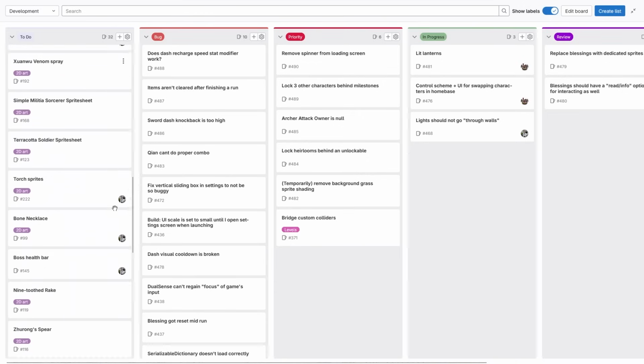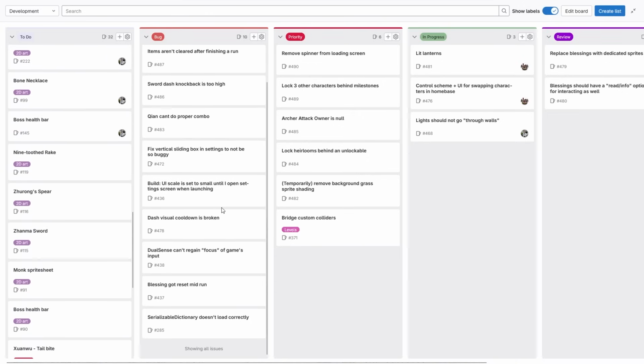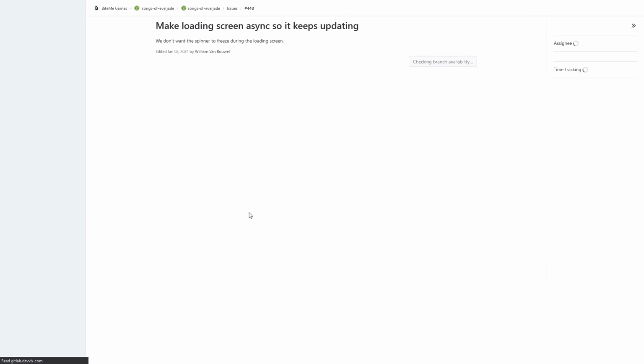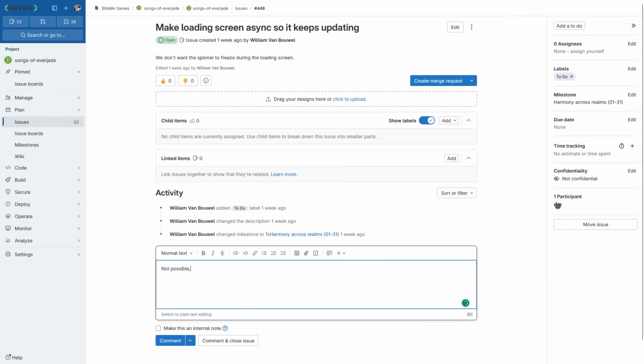And then a second big thing that you should do is scope trimming. So this is something that you can time however you want, but I would time this together with your monthly-ish milestones, where you go through everything you've planned for your game. If you're doing some issue tracking, you look at all the different to-do lists that you have, and you look at which things I actually do not need to have the game that I want. And this is going to sound very weird, because you're going to be like, well, I need everything that I have here, listed down.